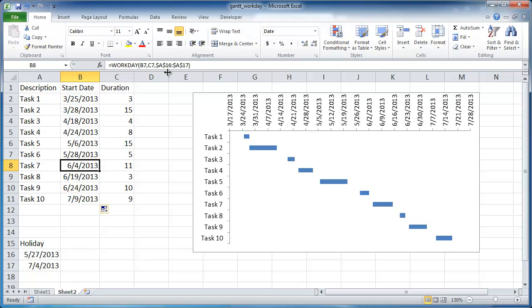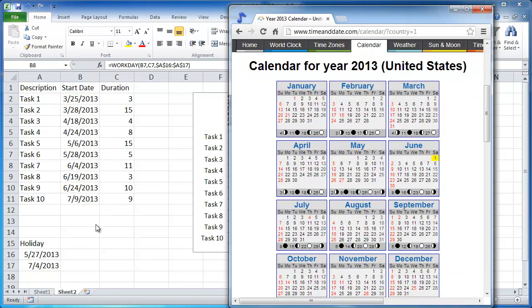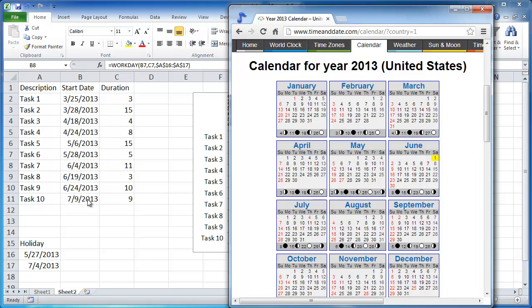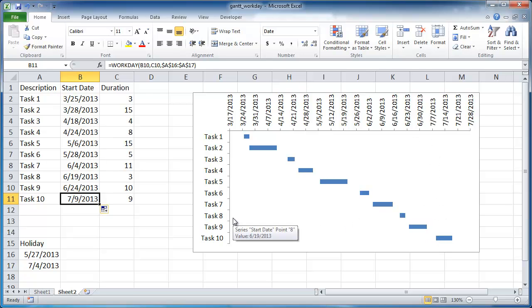So now that I've got the two holidays in here, you can see now it's done it correctly, right? It's calculated it correctly here. So what I can see here is 6/24, you've got 10 days: 1, 2, 3, 4, 5, 6, 7, skip the 4th, 9, 10, and the next task will start on the 9th. So here we see it started on the 9th and it's going to reflect here on the Gantt chart. So it starts on the 9th, right around here. So this is how you create a Gantt chart for workdays only. We're taking out the Saturdays and Sundays and potential holidays.